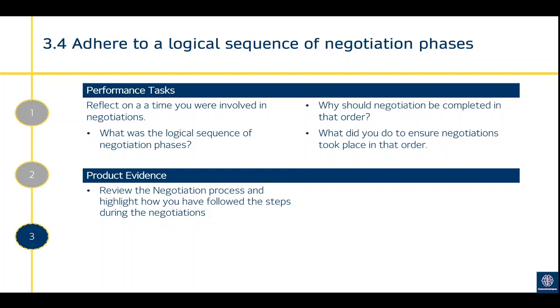There's no point going with the cheapest supplier when it turns out they've not had the experience in delivering the resources that you require, because it could be a resource that's critical to your project and it'll be too late by the time you find out that they can't actually deliver the amount that they promised to deliver because it's the first time they've done it. So it's important to do research into your suppliers, and that would be the first step.